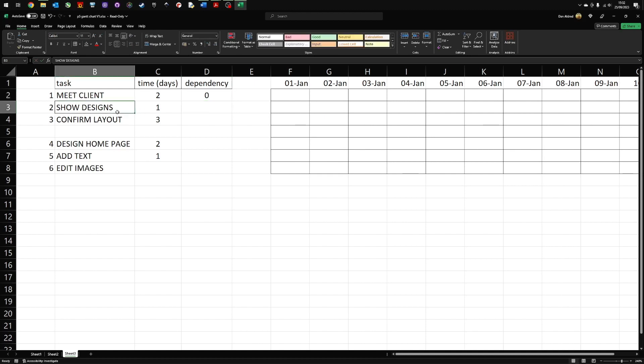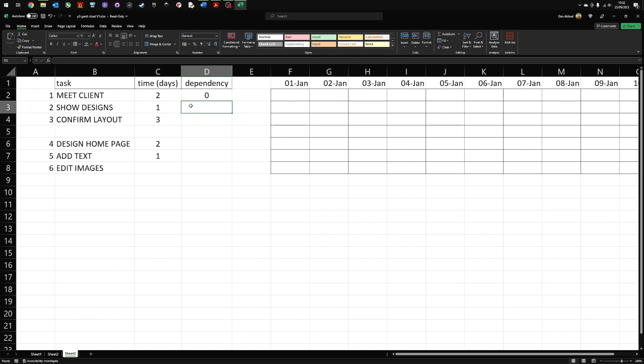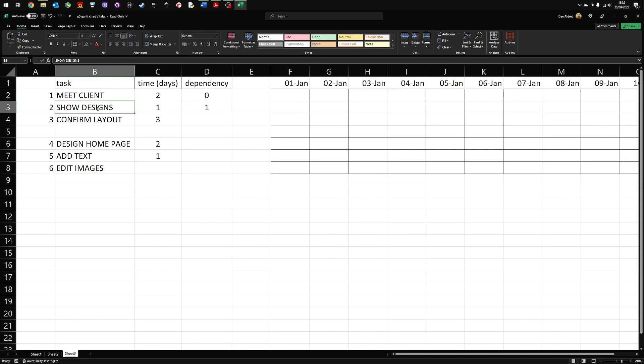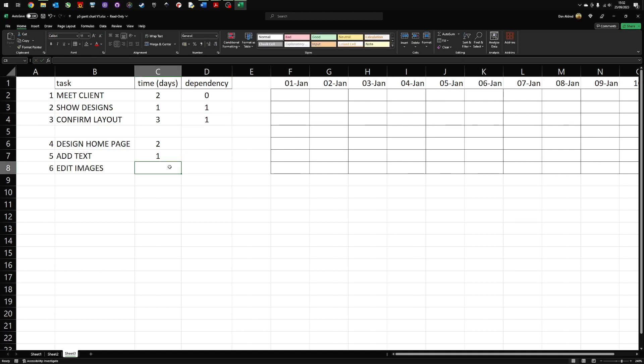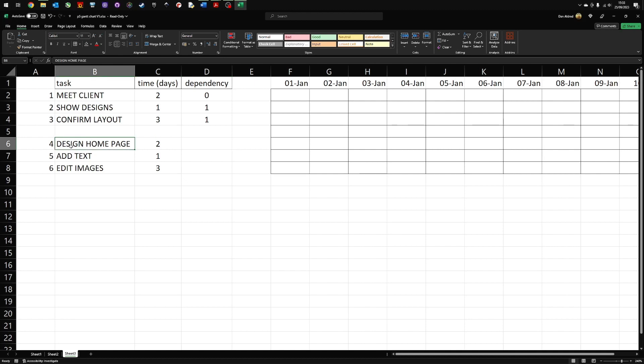I need to show the designs of my website, but I can't show the designs until I meet the client. Meeting the client is task one. Therefore, that is dependent on me meeting the client. Confirming the layout. I can't confirm the layout until I've met the client. So that's also dependent on task number one. So design the homepage. When can I design the homepage? Well, I can't design the homepage until I've confirmed the layout.